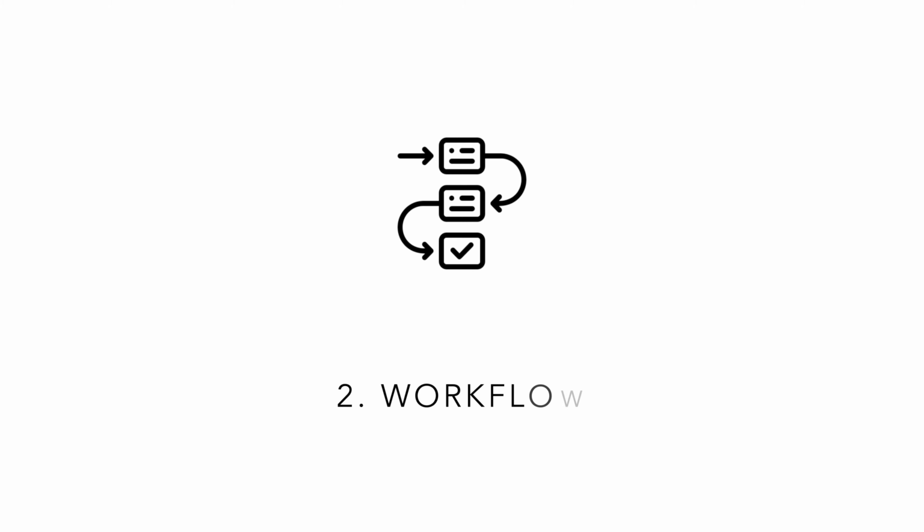Work item type is nothing but the output of the team. This is what the team delivers. Examples of work item types could be production support issues, enhancement requests, or even product backlog items. So before we can set up a Kanban board, you need to understand all the work item types that your team needs to deliver. Prerequisite number 2, workflow.